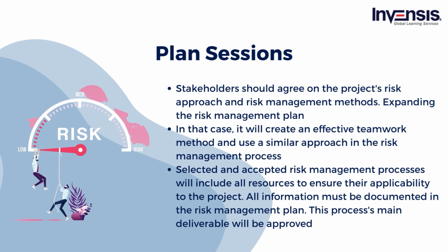The participants must include the project manager, at least a few project team members, other stakeholders, and the broader project team members responsible for initial risk responsibilities, methodology templates, definitions, timelines, and costs for the project. Risk management processes should be selected, and accepted tools that are used in upcoming processes will include all resources to ensure their applicability to the project. All the information must be documented in the risk management plan, and when it is approved it will be the principal deliverable of this process.